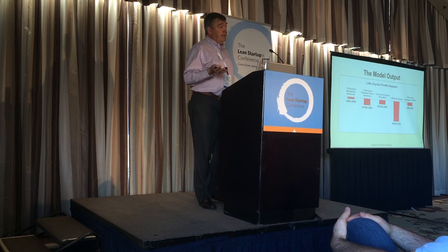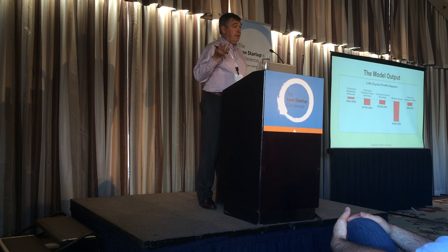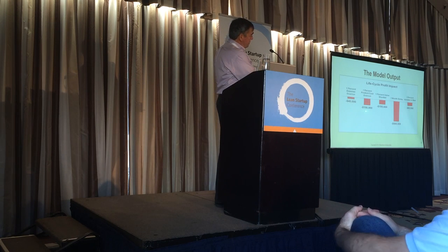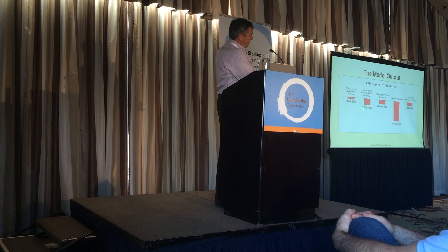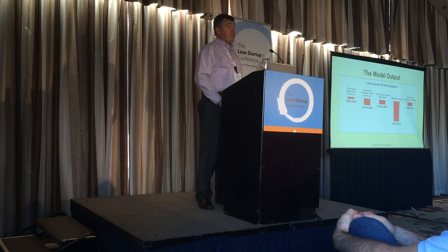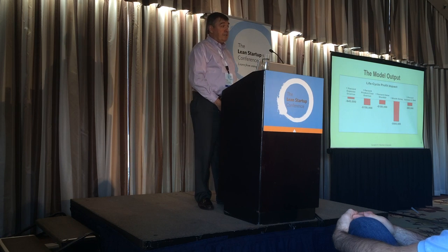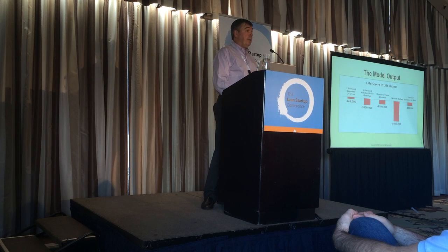With that information, I can now start addressing decisions that have more than one moving part. So somebody comes to me and says, if you give me another 2 months of cycle time, I can lower the product cost by 2%. I can say 2% is only worth 150,000, is 150 times 2, 300,000. 2 months of cycle time is worth $1 million. That's a bad trade. If they say I can save 20% of product cost, that's $3 million of profit impact for $1 million cycle time.